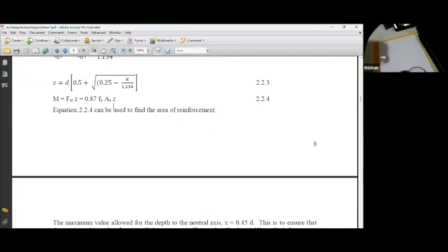The client will say, okay, I will allow you to come up with a solution on one agreement according to FIDIC conditions of contract. When you do value engineering, 50% belongs to the client. So the project cost is 5,000 million. 80% is 4,000, saving is 1,000.